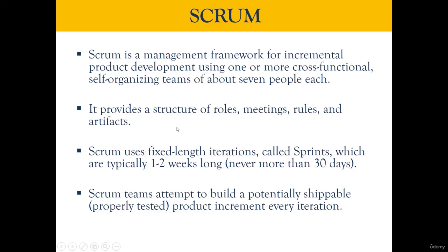And in the Scrum model, there are some roles, meeting rules, and artifacts which we need to ensure the decorum of the Scrum model. And Scrum basically uses fixed-length iterations. This is one of the most important points, guys, you need to understand. Each iteration is called a sprint.